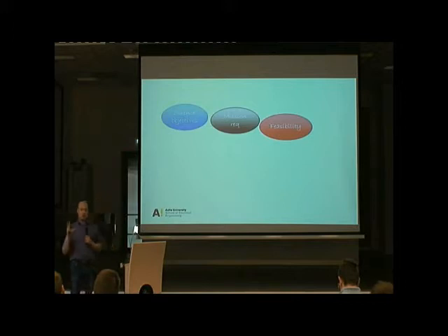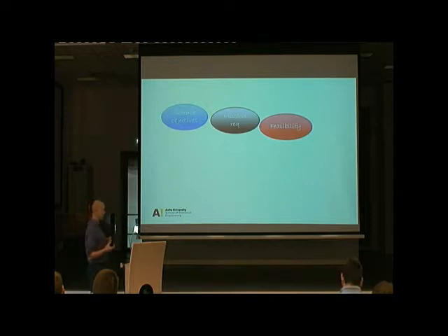So once you have your science objective and mission requirements, you start to study feasibility. Is it actually possible to do it? Are there technologies, solutions, launchers which actually carry this technology and make this measurement or requirements fulfillment possible?